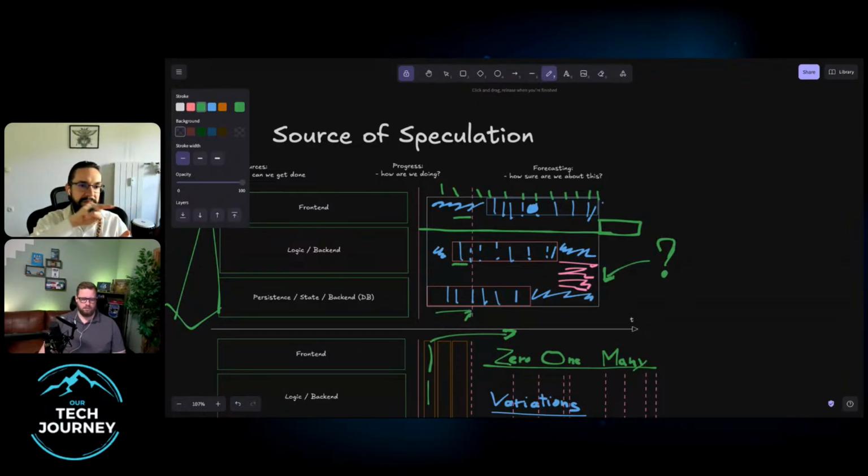Because the time you're spending exploring to understand the solution, somebody is waiting. And in their waiting, they are probably working on something completely unimportant and unrelated. And that just implicitly creates this scatter-gather mentality that makes vertical slicing impossible, essentially, right? Because the person whose review you'll be needing will be busy with something completely unrelated that you don't know about.